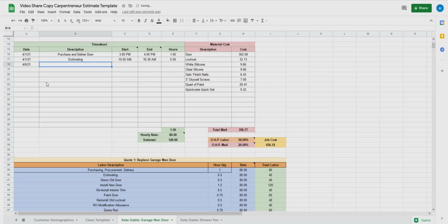So one of the reasons I really like estimating and then comparing is I get to see how wrong I am. But the good thing about that is it's a reality check for how long things actually take. And I get it wrong all the time, but I never feel bad about it because my pricing is such that even if I work longer than I estimate, I'm still going to make decent money.